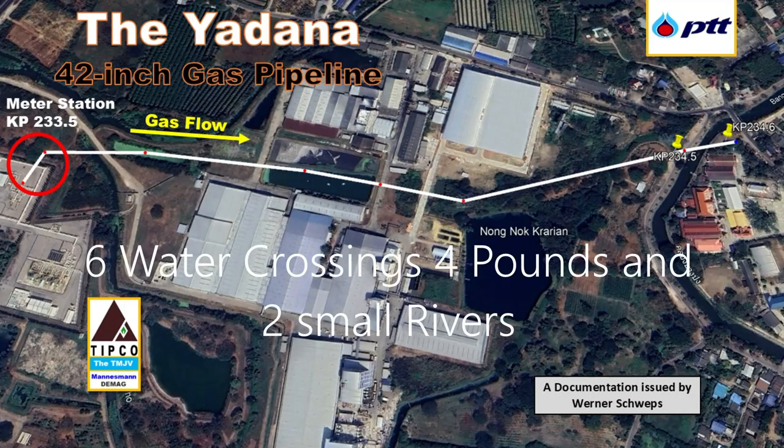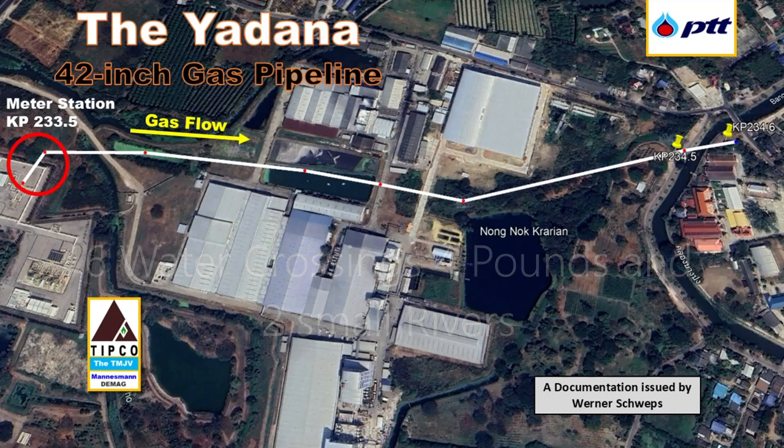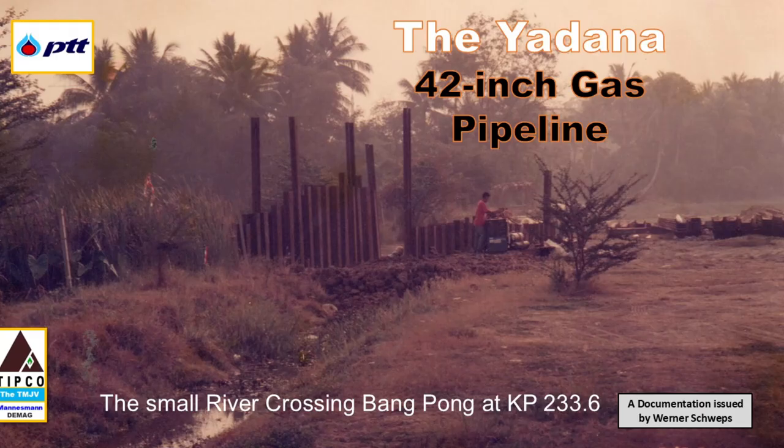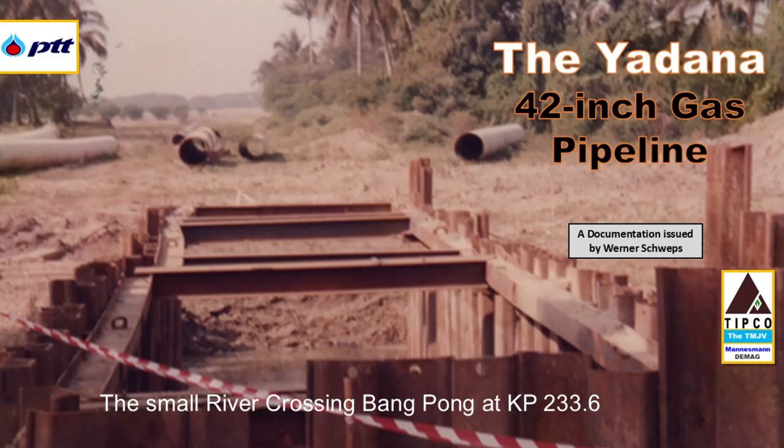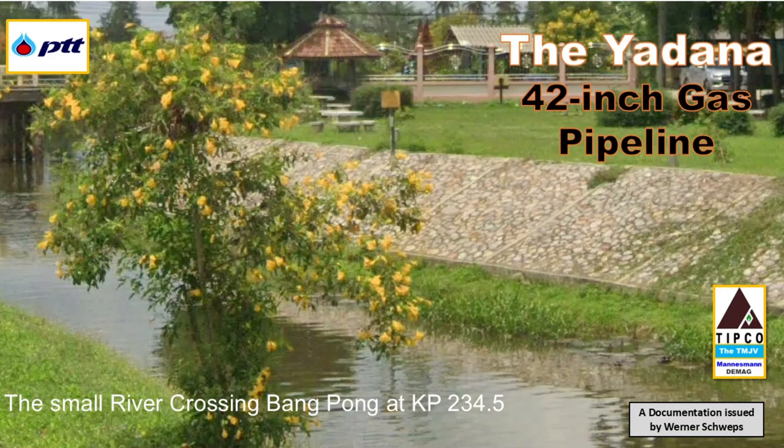In the area of the meter station, we had to cross 6 water bodies in a short distance of around 1,000 meters. These water bodies are located between the pipeline kilometers 233.6 and 234.6. Out of these 6 crossings, 4 are water ponds and 2 are rivers. Concerning the water ponds, we pumped those empty and conducted our pipeline installation work subsequently by using sheet piling. For the 2 rivers, we blocked those and diverted the water flow. Subsequently, we conducted all our pipeline activities including the hydro test and connected the outgoing pipeline to the meter station scraper vessel.